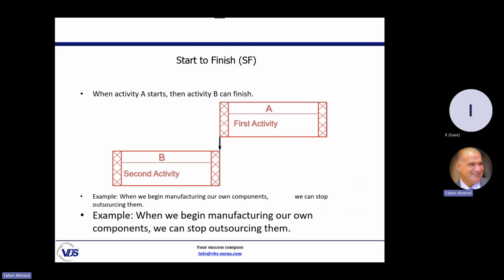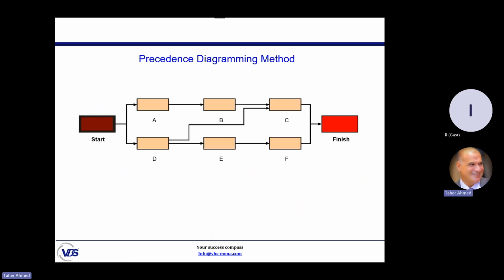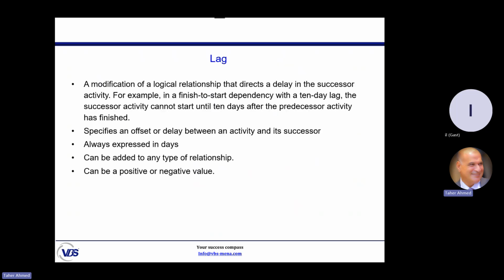I've never used it. I'm a Primavera user for 31 years now. I never use it because it is odd. And as a project management consultant, when someone submits a schedule using the start to finish relationship, I reject the schedule because it is not a logical relationship. Why do we build the relationship? Because we need to create the network as we represented yesterday.